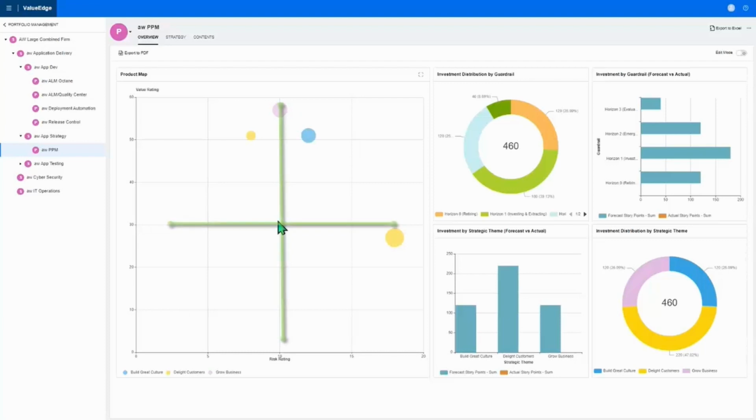And so if you imagine a four-square plotted area, in contrast, those objects that would have very high value and low risk can be considered or called in the industry sometimes your best bets, and those are the things that are going to be safe bets, introducing a lot of value but not introducing a lot of risk to the organization. And you would greenlight these things.